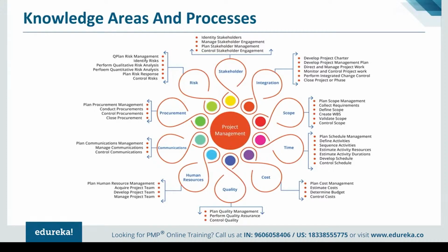Communication management plan will talk about, of course, creating the plan in itself, what to communicate, when to communicate, whom to communicate, and what's the media to communicate. So is it going to be a meeting? Is it going to be an email? Is it going to be a push or pull communication? So what are the communication channels that we're going to use? So all this data will be captured there. Once we have the plan in place, then we need to manage and control it effectively.